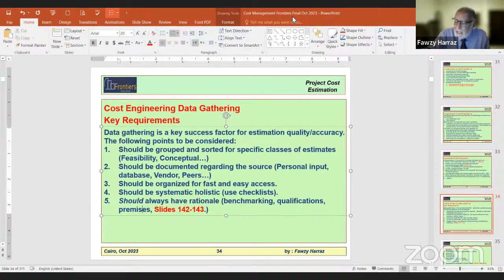The company says, I'm not running a project if the IRR is less than 10%. So if the IRR comes to be 9%, the manager definitely will seriously consider canceling. If it is 10% or 11%, it's still feasible. We know that we are paying much more than the real cost, but it's a feasible project economic-wise.